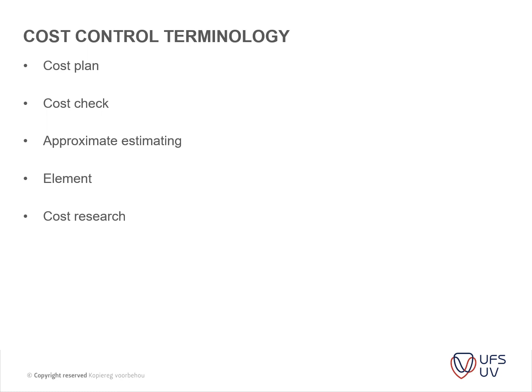And then you can have a look at the cost study. The cost study is basically breaking it down, and it has the following objectives: reveal the distribution of the cost. It relates the cost of any single part of the element to how important it is, and compares the cost of the same part of the element in a different building.